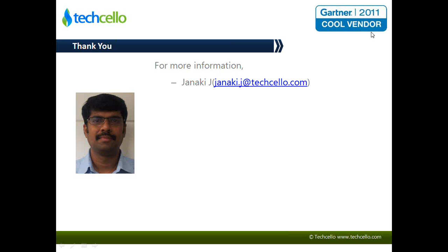It does multiple things. One, it gives a proactive approach, so your customers will see it as a value add. They see that you have thought through different angles, which they themselves might not have done in some places. And even though your numbers are going to be high, they understand that it's because of these assumptions that you came up with this number. Then they come back and say, okay, I don't think I need this level of scalability, you can cut it down. So they start giving their own recommendations on these things. So it's a nice guided approach to pull the information from your customers, and also safely keep revising your estimate.